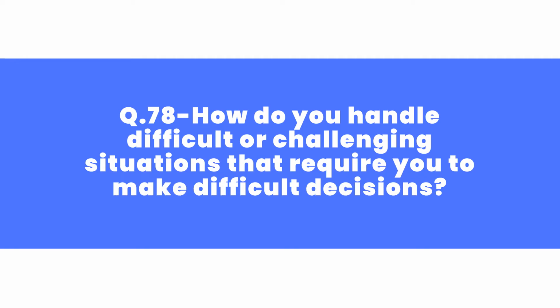After evaluating all options, I decide to bring in a temporary replacement team to fill the role until a permanent replacement can be found. I also review the project plan and timelines to identify any areas that may be impacted by the team member's departure and work with the team to make any necessary adjustments.